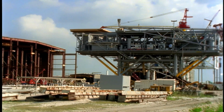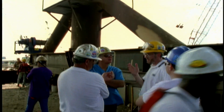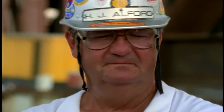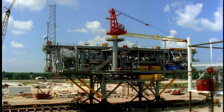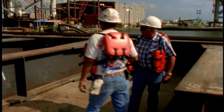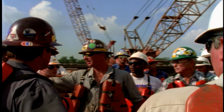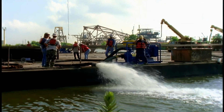June 29, 1998. After a little more than a year in fabrication, Spirit platform topsides are fully commissioned and ready to move offshore. Throughout the fabrication process, at both Universal Fabricators and at AGM, Shell Site Quality Assurance was on hand to assure that all Shell specifications were met. Shell Site Safety teams were active as well. Ultimately, the entire platform will be built with only 2 recordables and no lost time accidents as a result of the site team's strong support of the contractor's safety programs.